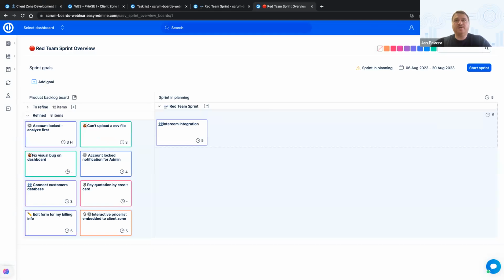So in the end, the key values are: clients must be part of the review, or some representative of the clients. You need to collect feedback immediately back to the backlog, not in some notes out of the system, but directly to the backlog where it is ready for refinement and the next realization.